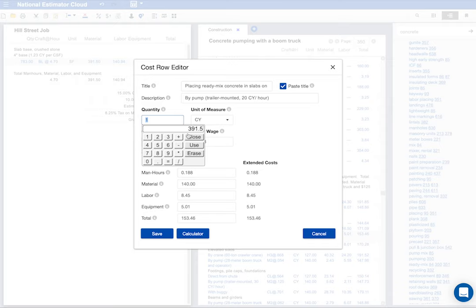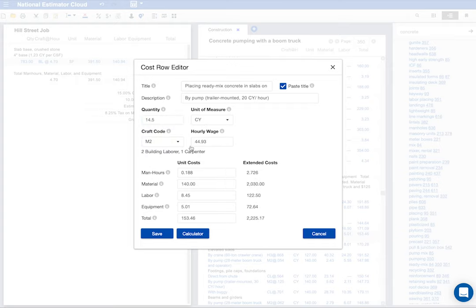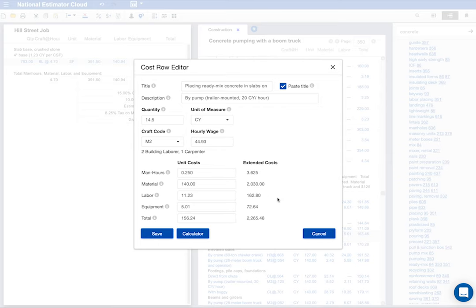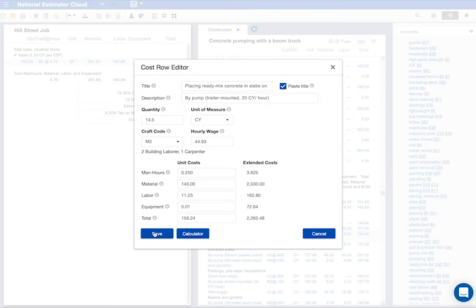I'll divide 783 by 2 to find the cubic feet. Okay, there are 391 cubic feet in this 6 inch slab. I'll divide by 27 to find the cubic yards. We'll need 14 and a half cubic yards of concrete. I'll press tab and check the numbers. The material cost and equipment cost look okay. But this labor cost looks a little light to me. I usually figure about one quarter man hour to place each cubic yard. So I'll bump the man hours up to a quarter hour per yard. And press enter. That looks better. I'm done here.